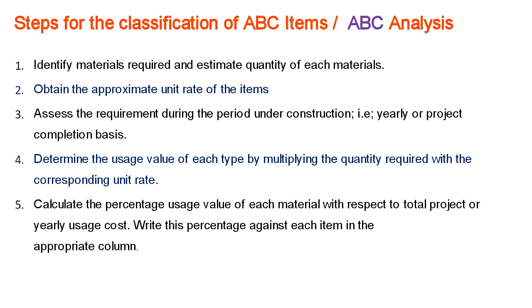And when we have the tender document, another thing what we do is, contractors will try to identify the various construction materials required, and they will try to get from the QS an approximate quantity of each of these materials, because the BOQ provides line items. Say the BOQ will have something like M30 concrete, M25 concrete, but concrete involves materials like aggregates and chemicals and other things, right?